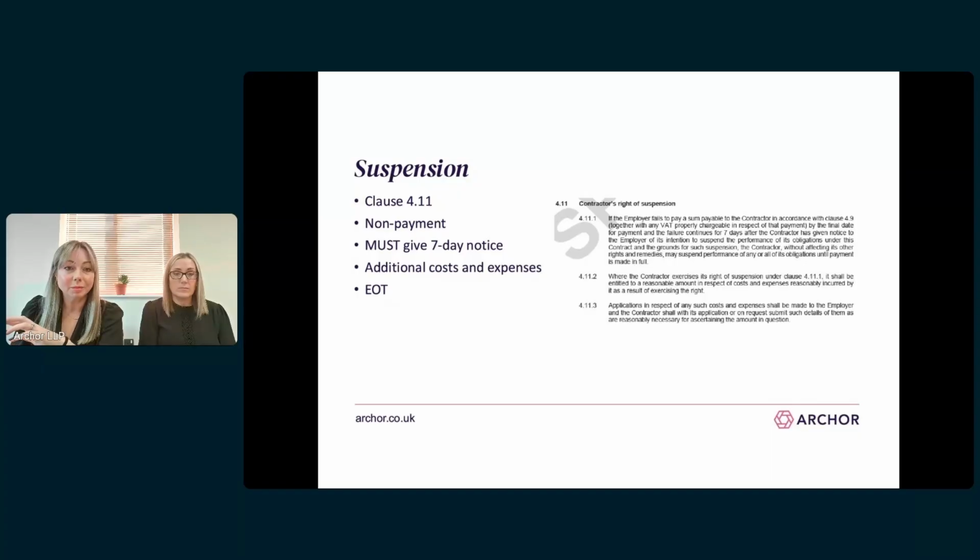Now, where this does apply is where either no payment notices or pay less notices have been issued in relation to an application and payment is not made by the final date for payment, or where a sum is certified by the EA but not paid by the employer. Suspension is a really useful tool for contractors, as employers quite obviously don't like the works being stopped for any length of time. But we have to make sure that there is a breach under clause 4.9 first.